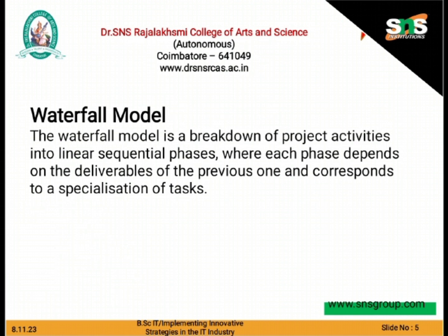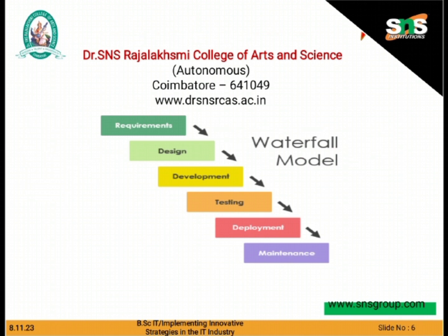The Waterfall Model breaks down entire project activities into linear sequential phases. Each phase depends on the deliverables of the previous one and corresponds to specialization of the task. The output of one phase will be an input for the next phase, making it flow like a waterfall. The first stage is the Requirement stage, where we collect the hardware and software requirements. Next is Design, where we create a blueprint before developing the software application. Then comes Implementation — the actual product development based on the design phase.